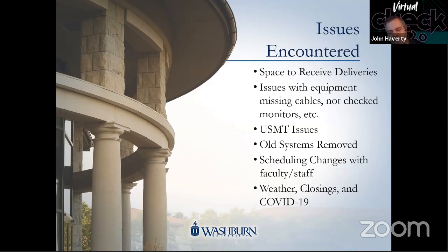Well, when that migration happened, as you would imagine, the USMT settings that we had to customize were overwritten. Luckily, we had a backup of it and we were able to move it over, but it was delayed. I think that was morning, afternoon, however long it took to troubleshoot what had happened. We started getting reports in from the installation team saying this wasn't working. We checked and found the problem. We were able to copy those files over and get them back into working business.